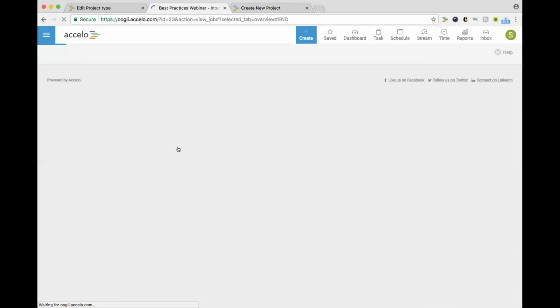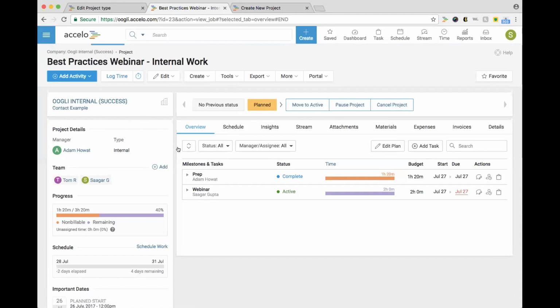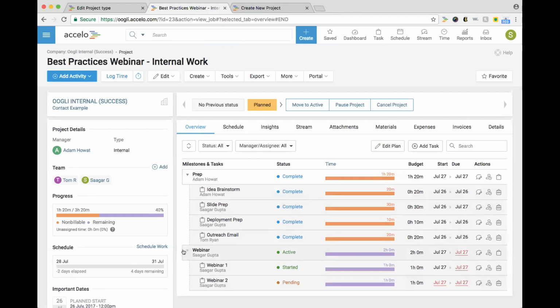And we're looking at it, again, from a best practice standpoint. How can we set up this project, and what would be an example of doing so? So we have this best practices webinar for internal work. You have prep, and we have the webinars. So for example, Adam can be in charge of preparing for the webinar, and it can have assigning out who's going to be in charge of it on our success team. So Adam will be the manager of that milestone. The idea, the slide prep, deployment prep, and outreach email. Again, there's different individuals, so 3 different total individuals, and there can be log time for each one. So we've logged 20 minutes of non-billable time across this task.